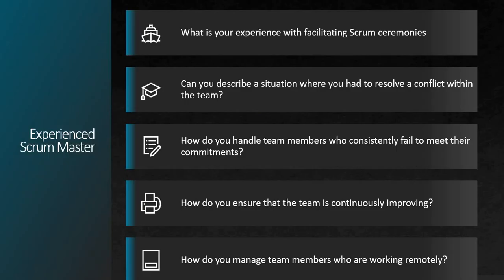What is your experience with facilitating Scrum ceremonies? As a Scrum Master, I have facilitated all Scrum ceremonies such as sprint planning, daily stand-up, sprint review, and sprint retrospective. In a recent project during the daily stand-up, I noticed that some team members were not sharing their updates, which resulted in a lack of transparency. So I implemented the Fist to Five method, which helped the team members to share the progress more openly and